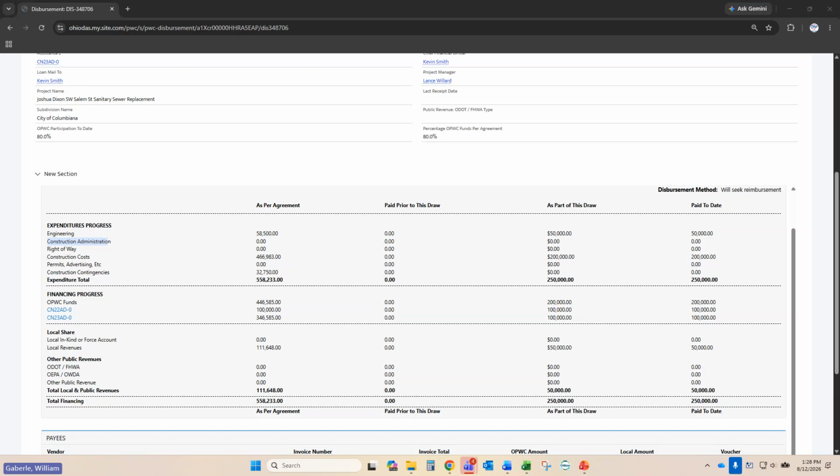Trying to see if something causes us to exceed the original budget, can any of that be revised? Okay, your engineering and your construction administration, so basically your total engineering, is pretty much capped at whatever your agreement is with us. So if you had $150,000 and you ended up with $200,000, in most cases, yes, you would be capped at the $150,000. If you have any concerns about that, you can speak to your program rep individually and a determination can be made from there. But in most cases, very rarely is it ever extended.